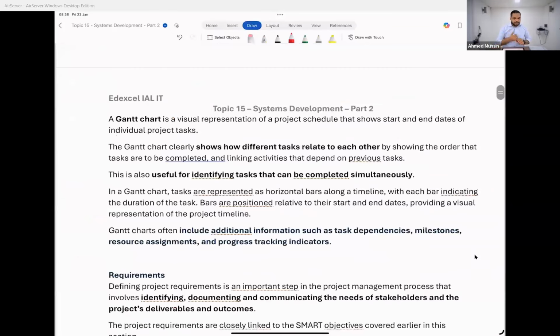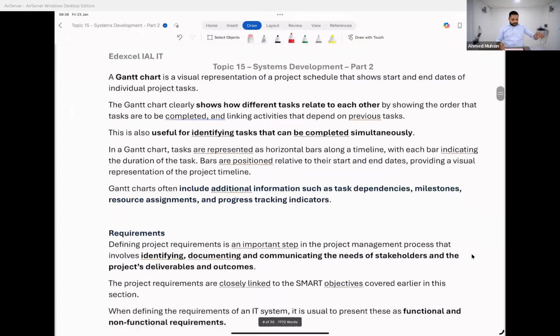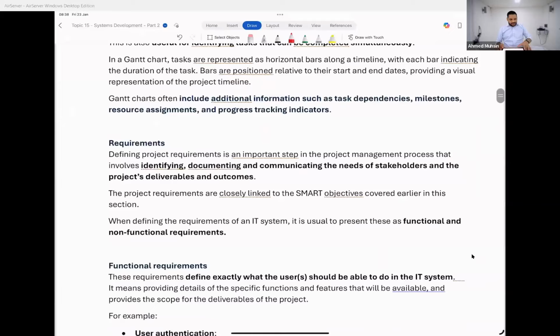So now you all know about Gantt chart. You all know about network diagram. To figure out critical path, which chart do you need? Network diagram. Getting critical path from a Gantt chart is very difficult. A Gantt chart can give you an overview of what's to happen in the project, but to identify critical path, you need your network diagram. Are you all okay with this? Right. Then boys, girls, we break in 2 minutes, but can you all just read requirements?